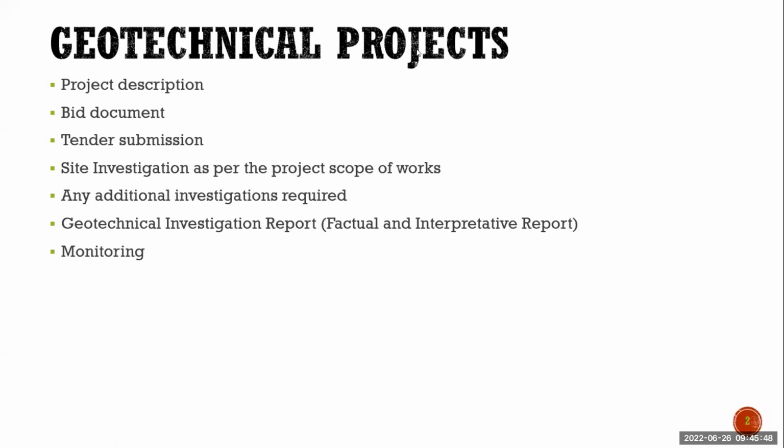Okay. So then monitoring. What is monitoring? Let's say you gave the geotechnical report. You are starting the construction based on this geotechnical report. You have to monitor whether it is reflecting as it is given in the geotechnical report, or whether some big variation is coming. Or let us say in the report you mentioned that for this particular structure, this foundation, it is within the permissible limit of settlement.